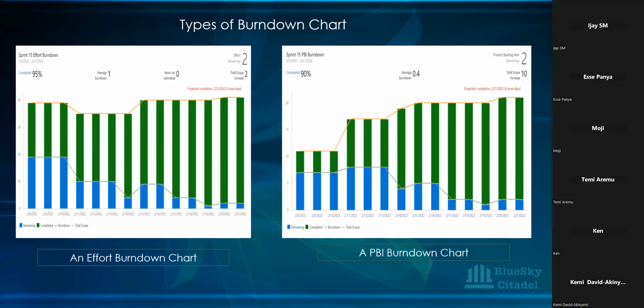Moji, this chart, is it from the data that we collated from team members and input into this chart? How does all this come about? These charts are the stories you've committed to. The way they move on your board, from committed to dev, from dev to dev done, that's the pace these charts look at per day.